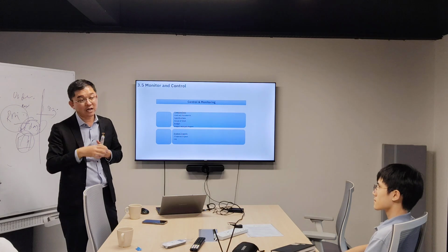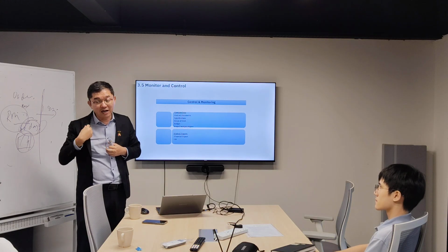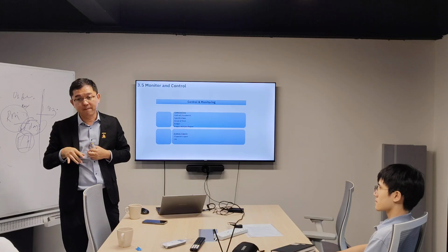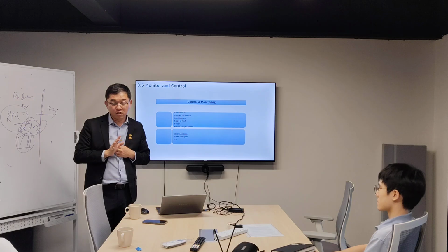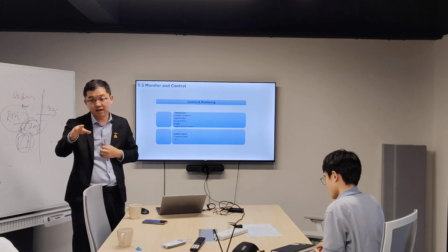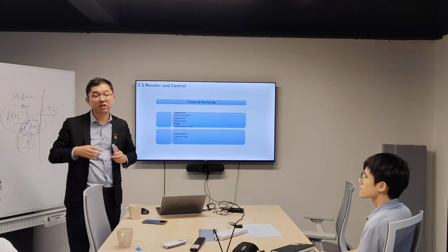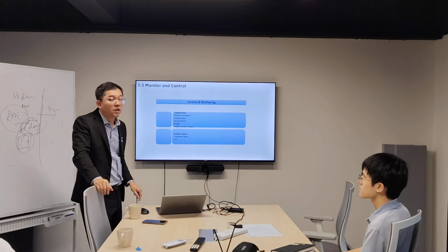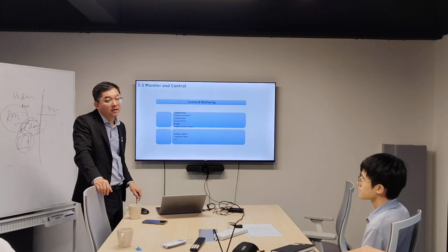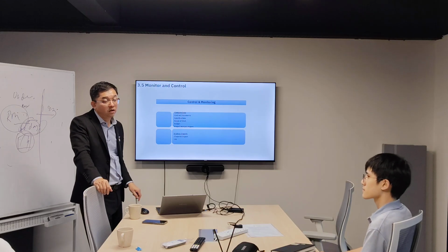Within a certain date, because under the contract, they will say the contractor needs to feed back to the client what the impact is. Then the client, if they have a concern, will directly negotiate with the contractor on the price, on the VO, before they proceed. You don't need a physical contract or anything written. That's an EI, engineering instruction, or the instruction comes from the employer already.